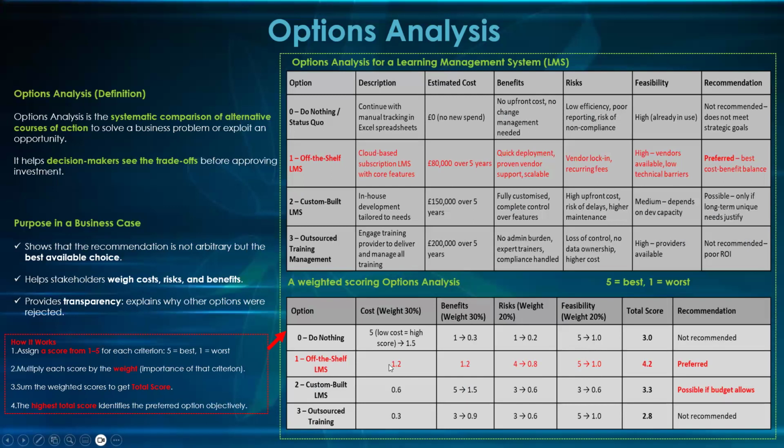It's the same thing that we're going to do with all of them. But at the end of the day, remember, it has a weighted score of 30% at the top here. So we multiply that 30% by 5.